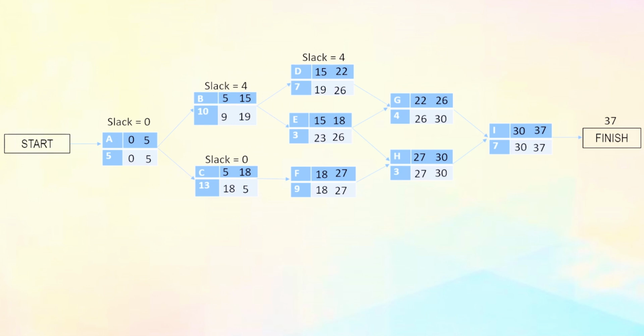Note, for example, that the activity E can begin anytime between days 15 and 23, and it can finish anytime between days 18 and 26.